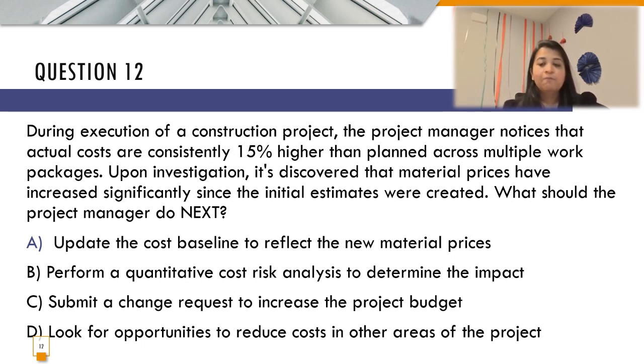The project manager should not take any immediate action before understanding the full impact of the material price increase by performing quantitative cost risk analysis. This will help us determine how much the overall budget will be affected, and our next course of action can be decided once we conclude how much the overall project price is going to increase.